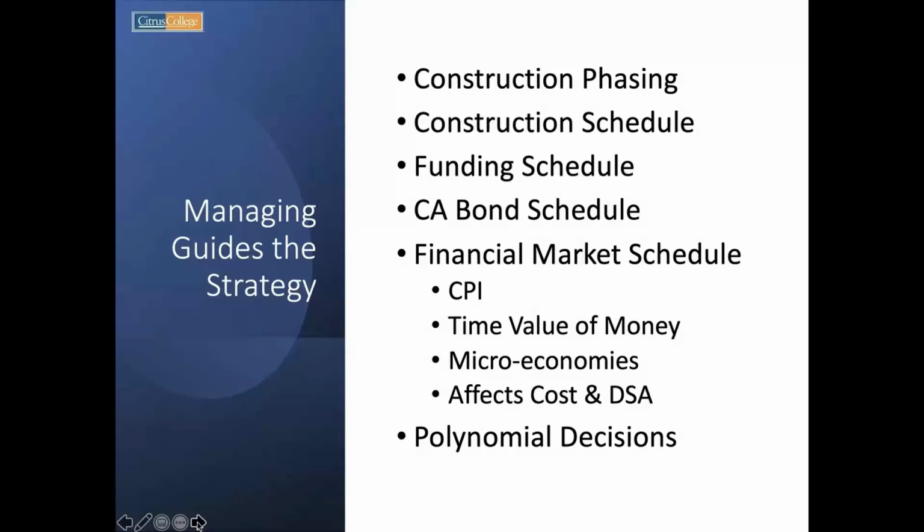That means that it would probably go into the bidding phase and then leading into construction probably about a year out. That's a good thing for us. All right, so phasing is extremely important on that project. We had a sit-down meeting. You can imagine that the fuel gas line goes throughout the entire campus. Broke it into 3 different phases, and that's how we're going to attack it, because you can't tear up everything at the same time.